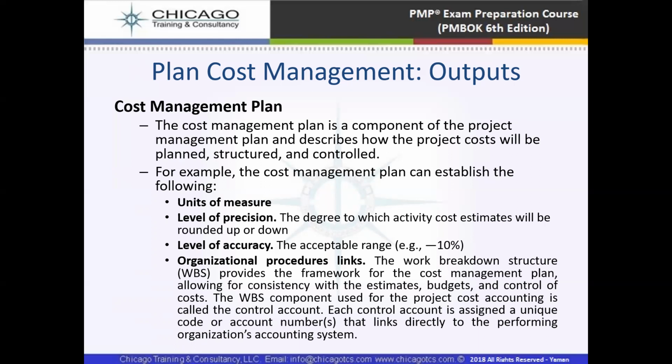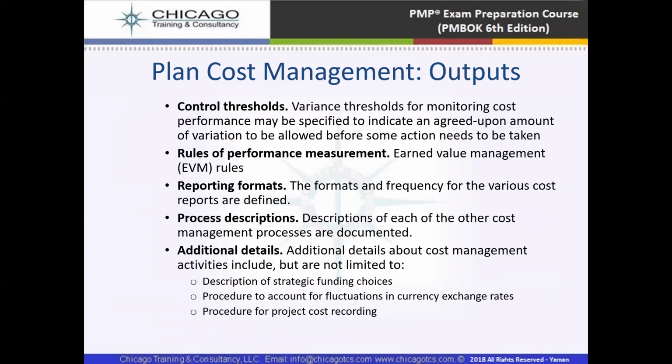So in every work breakdown, we will have the summary cost, and that cost will highlight in which particular area there is more cost, especially the MEP items, like the HVAC, or the chillers, which have large costs. So these work breakdown structures give us indications that, okay, here the cost is more. That's why the work breakdown structure is necessary in the cost management plan.